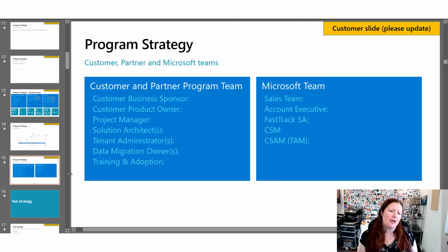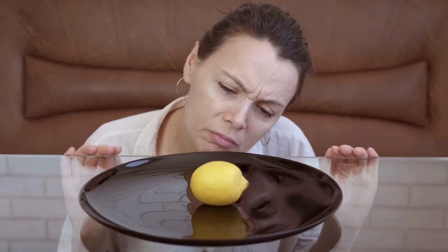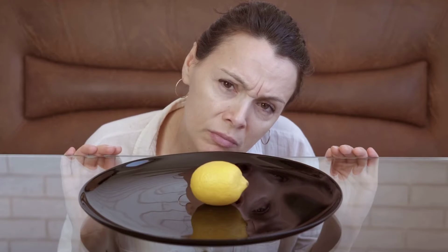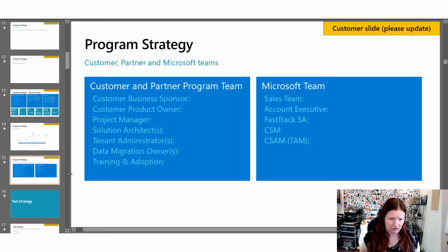When you don't have an appropriate number of product owners, business process owners, SMEs, or whatever you call these project resources, your project can lack vision and input into the design of the solution. And this can lead to low user acceptance and adoption of your system as well. Your project should have a good spread of users and ownership across the organization.